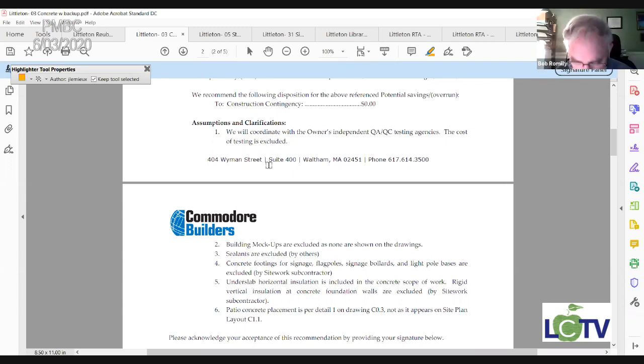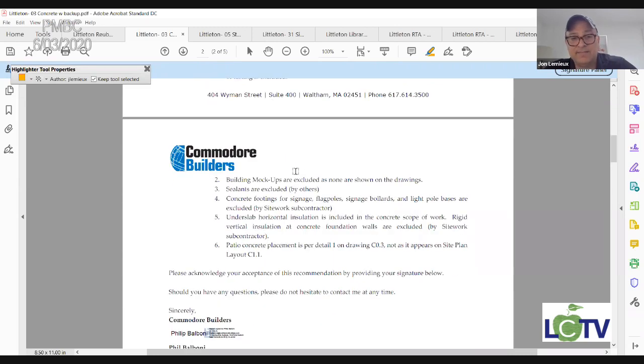Yeah, I mentioned to Steve about the winter protection there, and he said that's covered in a different location. So for the job right now, for winter, in my mind, this job, depending on the schedule, likely doesn't have winter concrete. This concrete's going to be in August, well in advance of any concern about winter concrete. Now for masonry, when we ultimately see the stuff for masons, that's part of the GMP package. I'm sure in the masonry section, that's a trade contractor or a filed subbidder that was put in there for them to own it. So it's a good question, but I think we're covered here in this site work, in this concrete category.